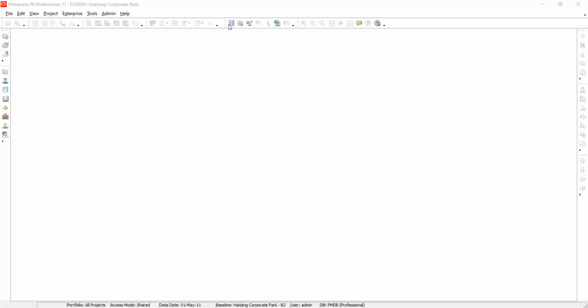In case it splits, it means that there's an activity that is running from Monday to Friday. Another one is running from Monday to Wednesday. So it can decide that let them work on this one that starts from Monday to Wednesday by just doing Monday and Tuesday. Then they stop on that one. They first go and pick the other one. Then they finish the other one and they come and finish this first one. So it ends up splitting the activity. Yeah, so that's in the background how resource leveling works, and some books will call it resource smoothing or smoothing.